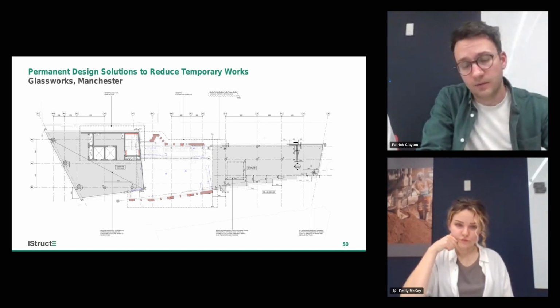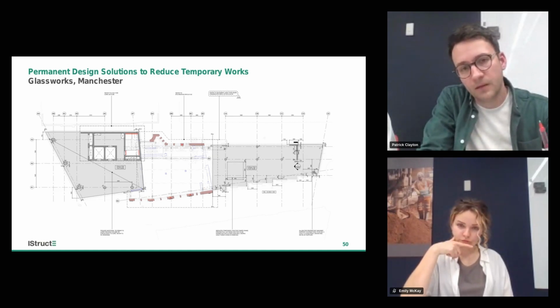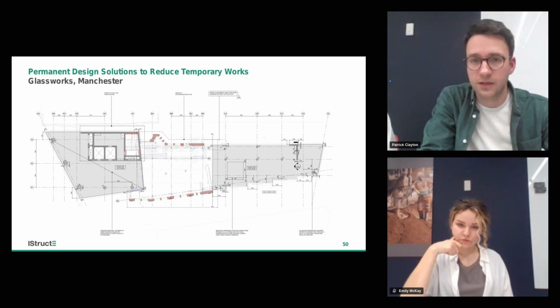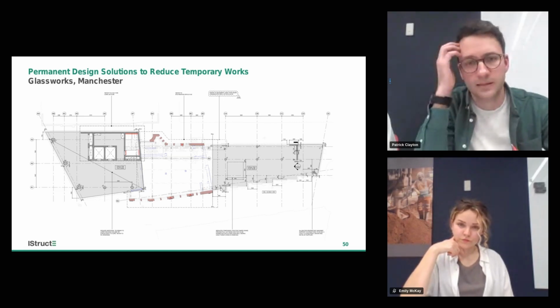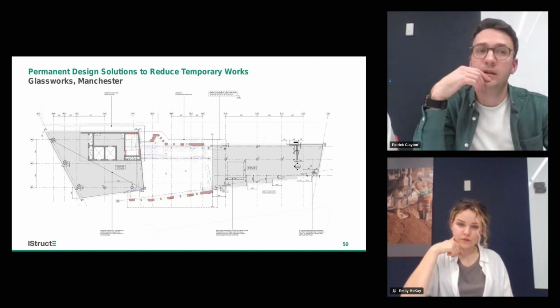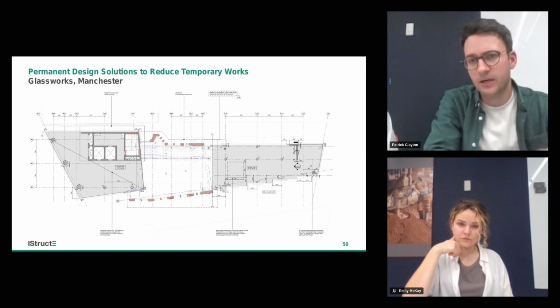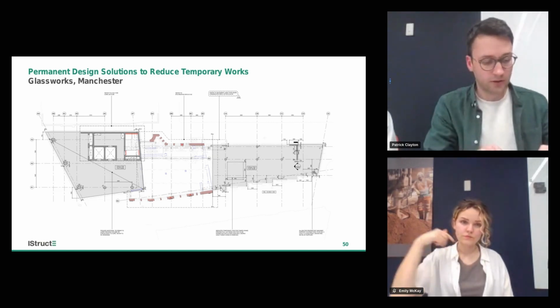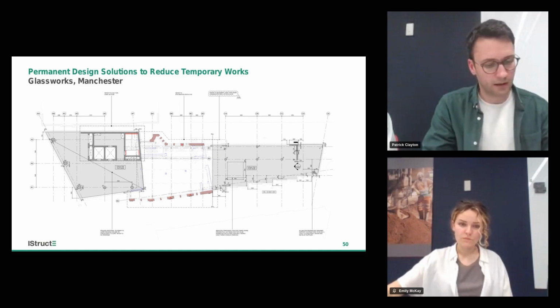The other one was steel frame, foundations, movement joints between everything. The other one was the stability system. So Zone A is now completely separate from Zone C at the end there, so we had to totally reimagine the Block C stability system as well. It wasn't an easy change on the permanent work side of things, but it was absolutely the right thing to do. And there was just about enough time to capture that as well without impacting program.